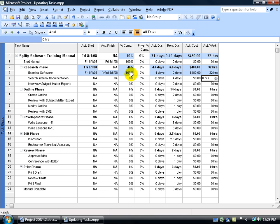So I can mark it 100% complete, I can type in the actual duration four days, or I can type in the actual work for 32 hours. It'll go ahead and calculate that.